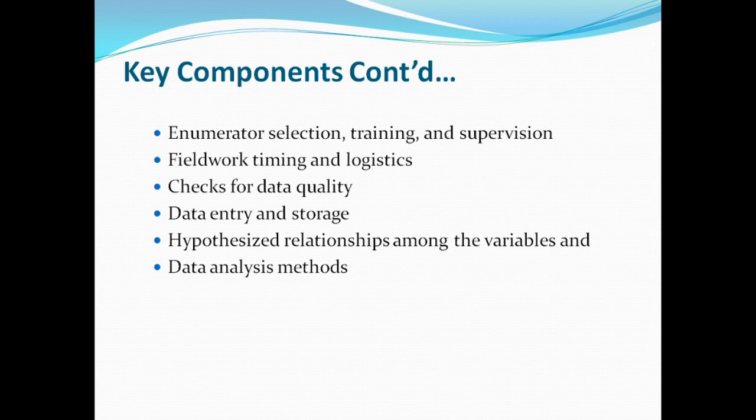So for project assessment, the discussion should identify not only the methods used, but the timing of the assessment event, that is, for example, baseline studies, annual reviews, midterm and final evaluation, and the rationale for selecting evaluators with specific skill sets and independence, that is, internal versus external evaluators. So why are you using them? You need to rationalize that as well.